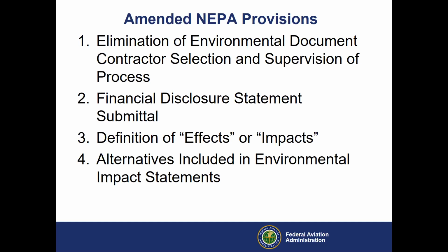The terms cumulative, indirect, and direct as they relate to effects have been removed from the regulations in favor of a more general definition of effects. Effects are defined as changes to the human environment that are not only reasonably foreseeable, but also have a reasonably close causal relationship to the proposed action or alternatives. Keep in mind that word causal, that's the real focus here.